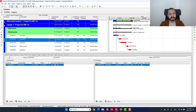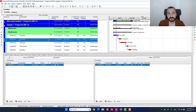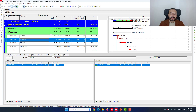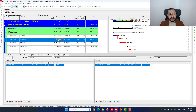I'm not saying that you should disregard all changes. Some changes are realistic, documented, and justified. Some changes might have been discussed with all project parties and agreed upon. But I am saying that this method will allow you to investigate the schedule changes and the associated impact on the delay analysis. It's up to you if you want to revert the changes back or continue the analysis this way — but it will give you this extra dimension in analysis.